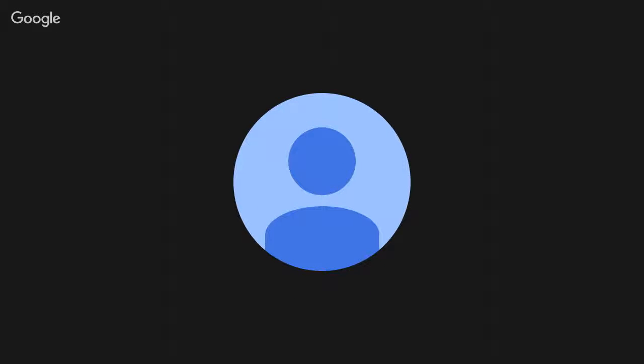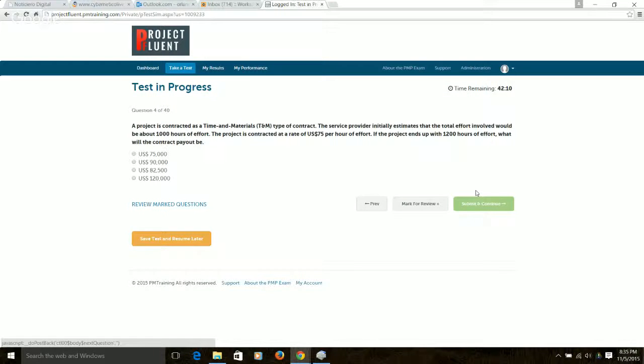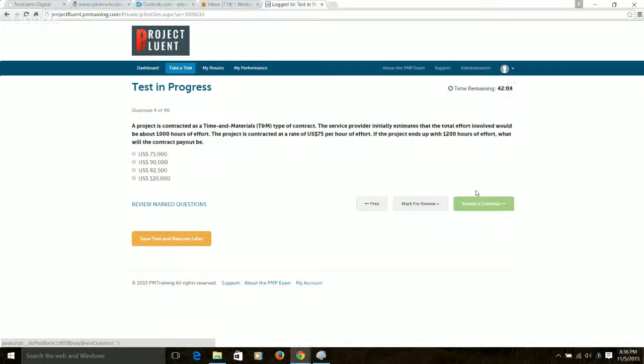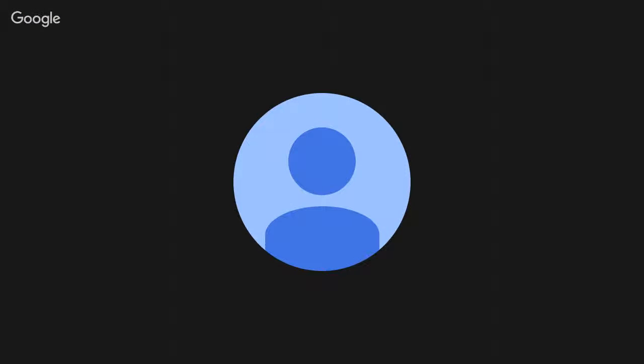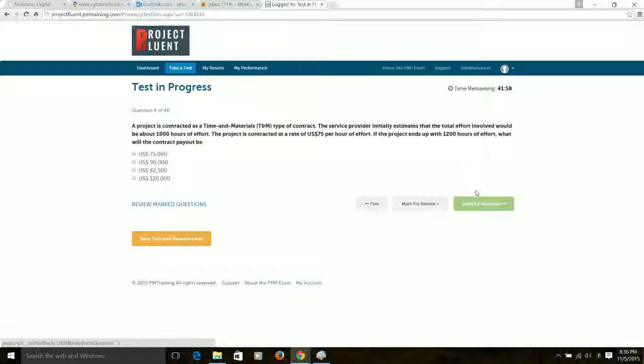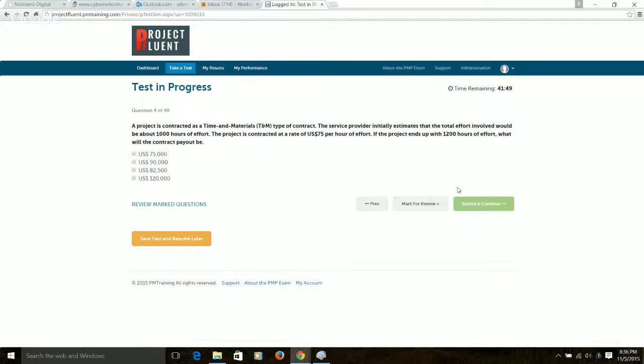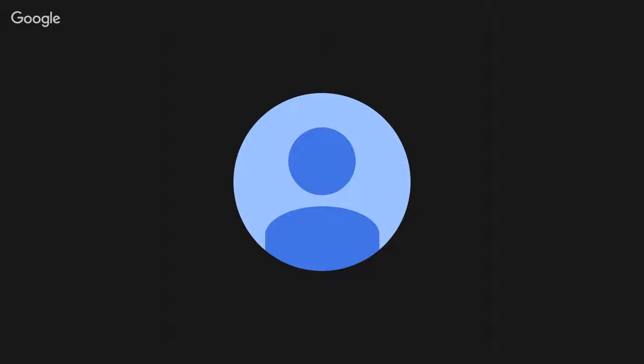What would the contract payout be? It's time and material. It'll be 1,200 times 75. Exactly. That'll be 75,000 plus another 15,000. It'll be 90,000. Yes, 90,000. Yeah, 90,000 is one of the options. I'll take that one.